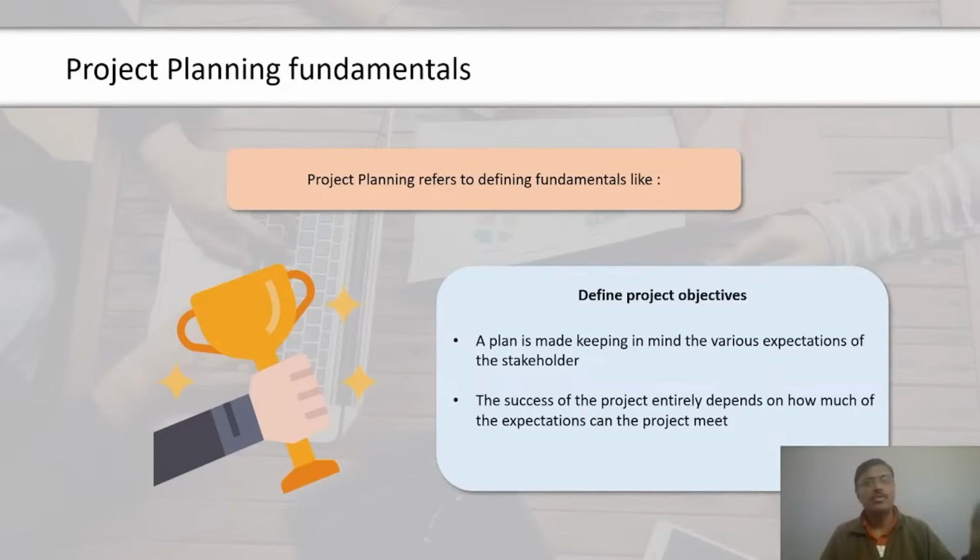So now when we have a Gantt chart on the screen, we can notice that the tasks here are in the reverse order. So what we will do is, we will click on these tasks and select the format axis option. Here, we will select categories in reverse order. We can see a Gantt chart is now in order, like we have a task 1 on the top and task 3 at the bottom.